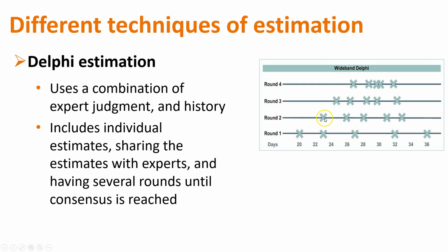The next time they vote again, and we're still 23 to 33. That's still 10 days. And especially when you're talking about sprints or something like that, that's a bit of a difference. You need to get it to where you're refined enough to be within a smaller percentage. Like maybe everyone's 10 to 20% off on your high and low end.